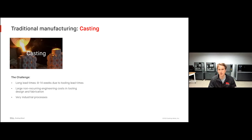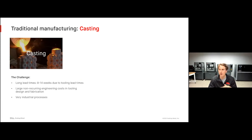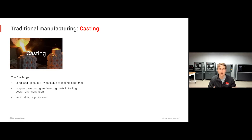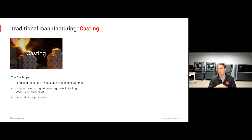Usually that is due to the tooling. For each different geometry you want to make, you have to have molds, you have to do wax injection, and if you're doing die casting, you have to have these hard tools made that obviously take a very long time and require highly skilled labor. Associated with those tools also comes lots of non-recurring engineering costs, both in the design and the fabrication of that tooling.